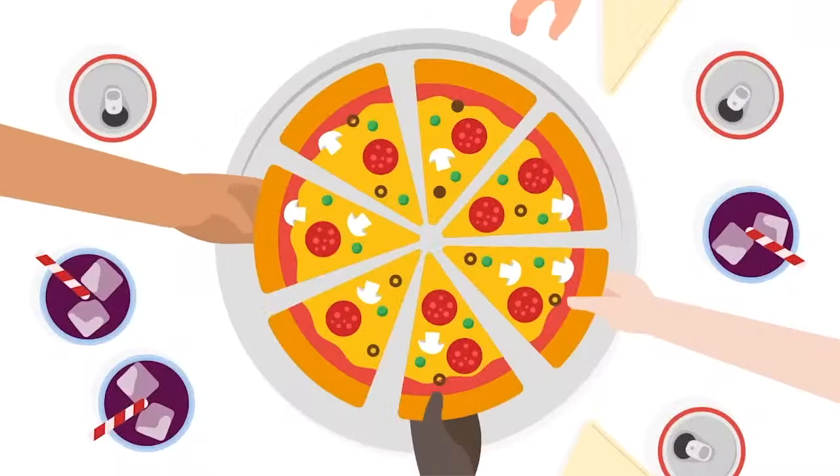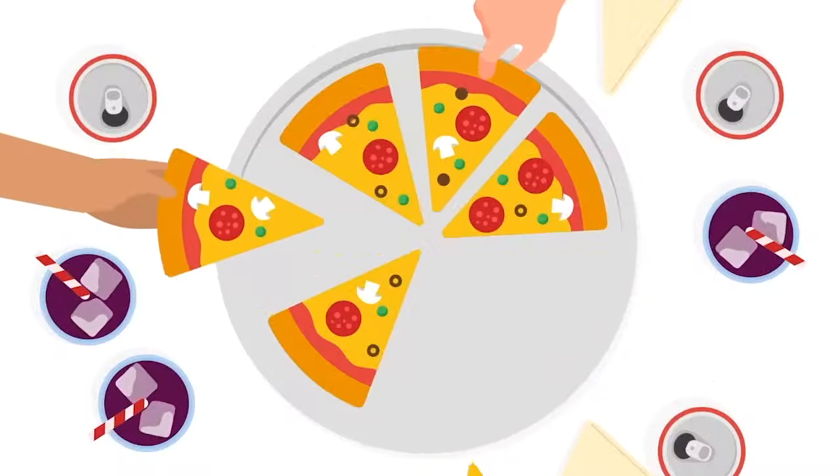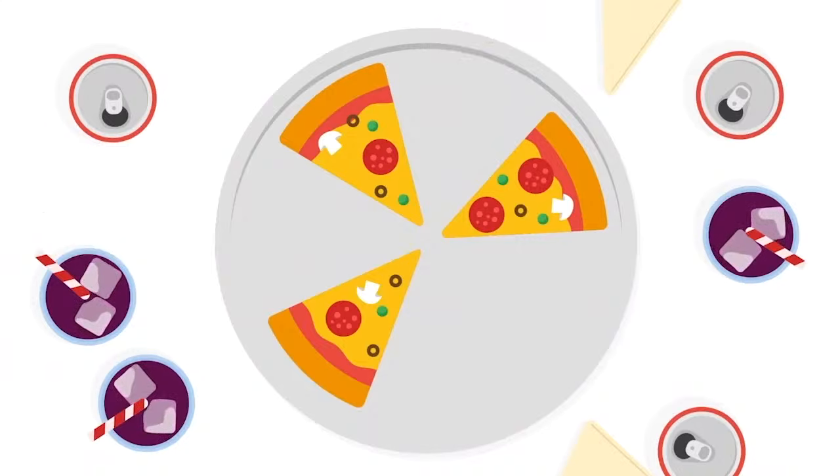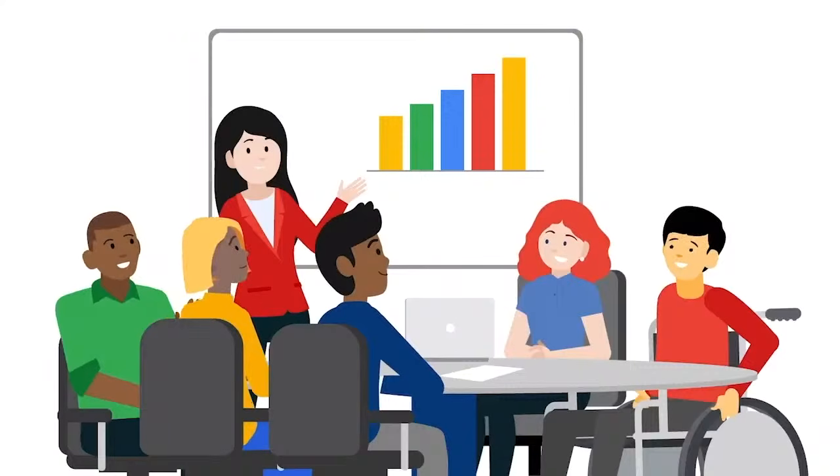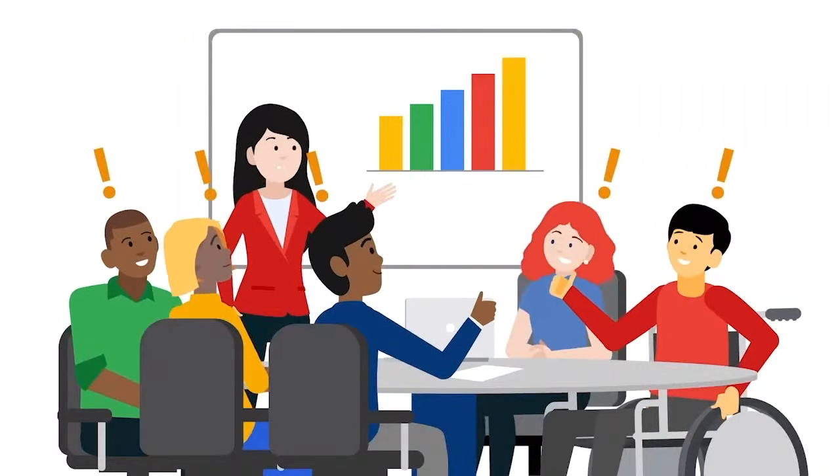Ideally, a Scrum team should be cross-functional, with around 3 to 9 team members. Some call this a pizza-sized team, because it has the same amount of people who could share a large pizza. If the team is too small, you might not have the diversity of skills to get work done. If the team is too large, it gets hard to distribute information. Lastly, Scrum works best for projects where the team and management are open-minded, adaptable, and value continuously learning how to be a better team. Trying to force a team to do Scrum will almost always fail.